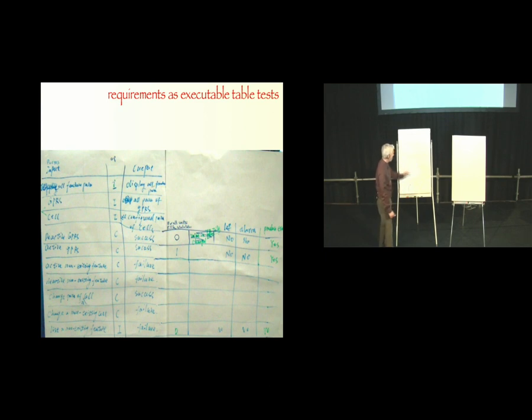And when I'm coaching teams, we usually do it near the end of the sprint, because it's not for the current sprint, it's to support future sprints. And then this kind of work of doing modeling to define the acceptance tests in pseudo-Robot happens during the product backlog refinement workshops that happen every sprint in Scrum.